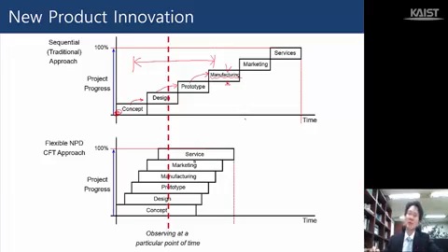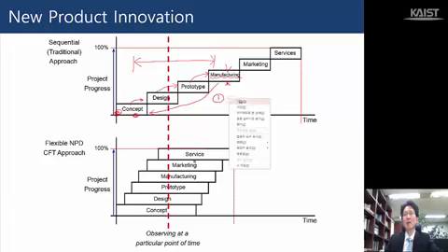And therefore, probably manufacturing people want to fix the problem. There are a couple of methods they can use to fix the problem. What is the most important? What is the most fundamental solution? The fundamental solution is you go back to concept again, and then you fix the problem in the concept development. So you actually go to the concept.